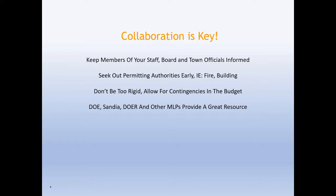When you talk to your staff and get them on board — the town officials, everyone wants to know what you're doing, why, what the advantages are, what it costs. These are people you see in the coffee shop, the grocery store — they want answers. We made sure everyone in town was aware of what we were going to do. During permitting, we met with the fire department very early to make sure they were comfortable with lithium ion. We also talked to the building inspectors, the conservation commission — everyone. The last thing we wanted was someone putting a stop gap on the project before we could get going.